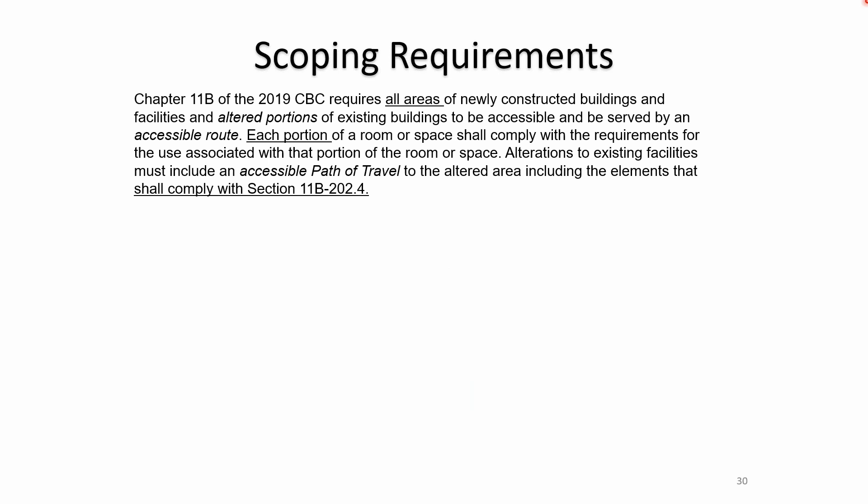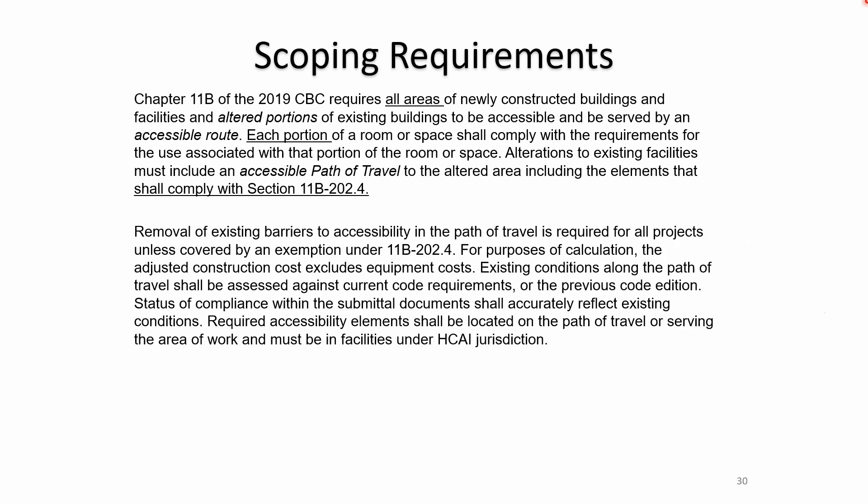The CBC requires all areas of newly constructed buildings and altered portions of existing buildings to be accessible and be served by an accessible route. Each portion of a room or space shall comply with the requirements for the use associated with that portion. The removal of existing barriers to accessibility in the path of travel is required for all projects unless covered by an exemption. The existing conditions along the path of travel shall be assessed against current code requirements or the previous code edition — going back to 2016.